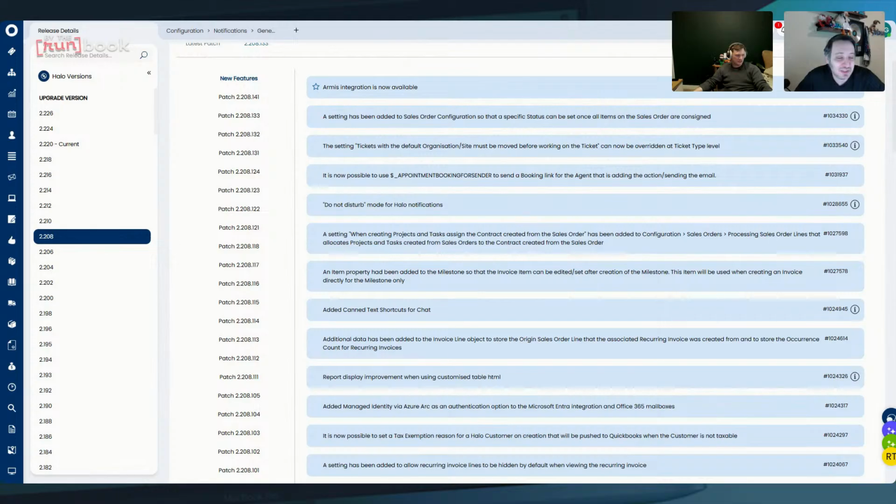And this is really, we actually recommend doing either a prepaid contract if it's going to be something that's paid, or even a fixed contract for unlimited hours if it's a flat fee, whatever. And you can still do profitability and tracking of time over months or whatever. Yep. You do monthly billing for most accounting purposes, and it just makes it super easy. So this is going to allow you to basically not have to manually associate the project to the contract.